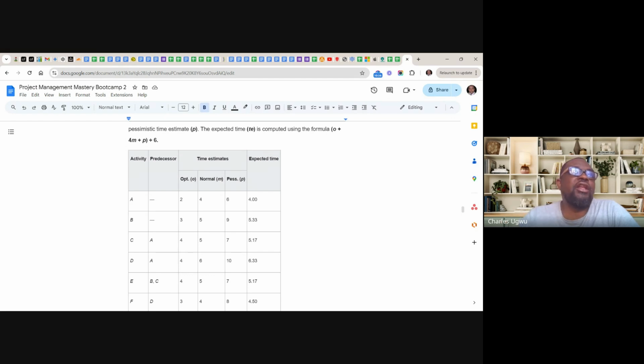There are a lot of things depending on that project charter being done. Everything from the planning to the execution cannot happen until the project charter is out. So if the project charter is delayed, it is delaying so many activities.